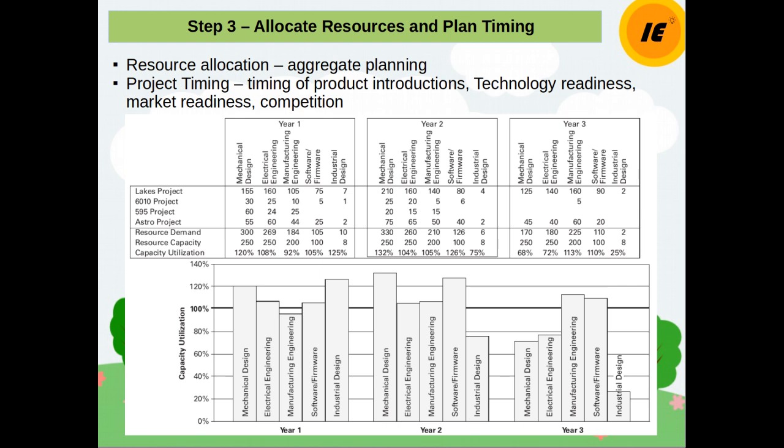Determining the timing and the sequence of projects, sometimes called pipeline management, must consider a number of factors including timing of the product introduction, technology readiness, market readiness, and competition. Timing of the product introductions basically means generally the sooner a product is brought to the market, the better. However, launching a product before it is of adequate quality can damage the reputation of the firm.